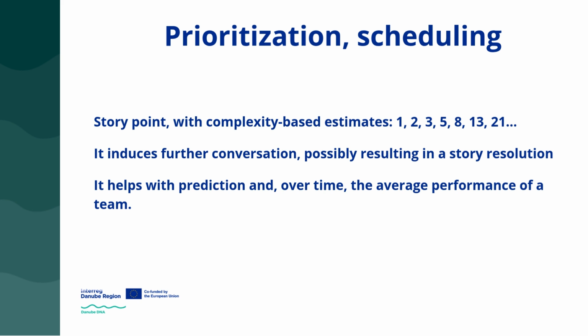Using the example from the diagram, we can point to the red-framed section, showing that this is the realistic amount of work that can be completed in the next iteration. If the client wants to add new stories, they need to replace some of the existing ones within that red-framed area. I have now touched on how prioritization and estimation work.